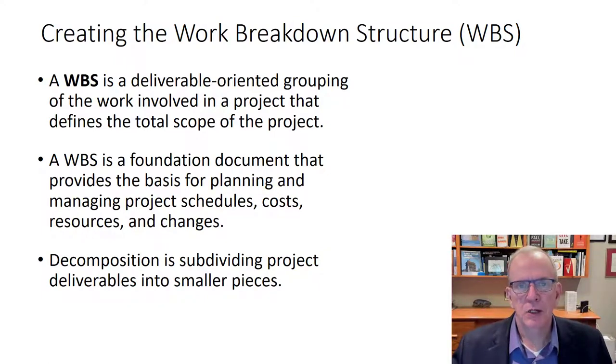As I may have mentioned in a previous lecture, you can develop a work breakdown structure from the bottom up, so from beginning to end of a project, or from the top down. Now in construction, in most cases, we're going to break down a project from the top down because most projects are somewhat larger. If it's something like a kitchen renovation or a house, and you do them all the time, you can pretty much run the activities from beginning to end.